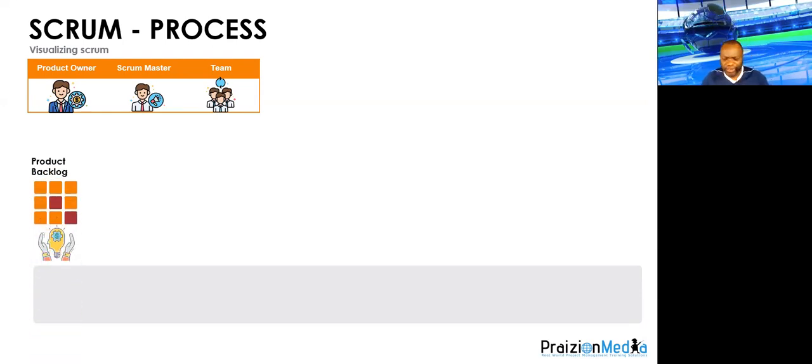It starts off with an understanding of what the business wants in the form of a product backlog. Think about a product backlog as being a list of what the stakeholders or clients want. Now, just because they want it doesn't mean they're going to get it. This product backlog, which you could look at as a list of all that the client wants, needs to be broken down as you proceed throughout time in the endeavor.